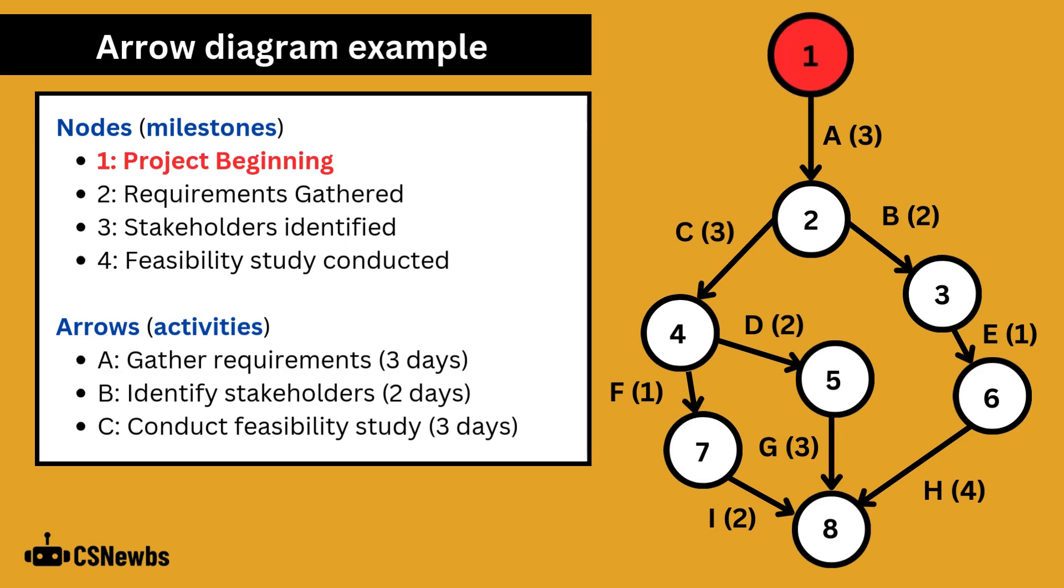Here's an example. Node 1 represents the beginning of a project. The first activity A is to gather requirements and it will take three days, at which point the project will be at milestone 2, which is that the requirements have been gathered.